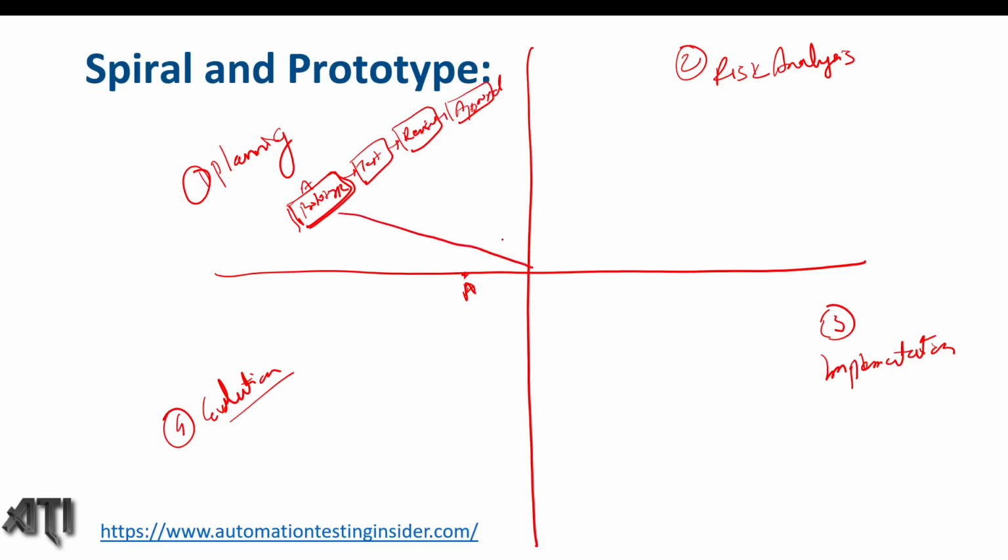And they can be joined like this. Currently I'm planning for module A in the spiral model, guys. In the planning phase, generally we get the requirements and analyze them with the help of the BA. In this particular planning phase, we have created the prototype, gotten it tested, and gotten it reviewed by the customer. If we get the approval, good. If we don't get the approval, then we have to revise our prototype and follow the same procedure again. Once it is approved, this phase is passed.